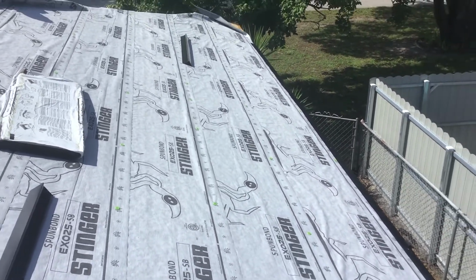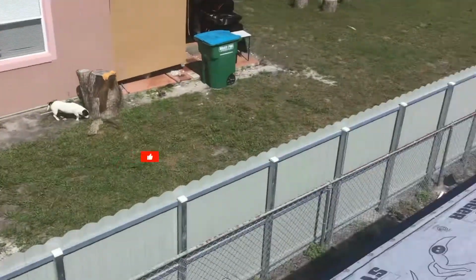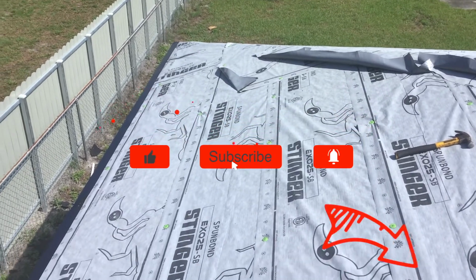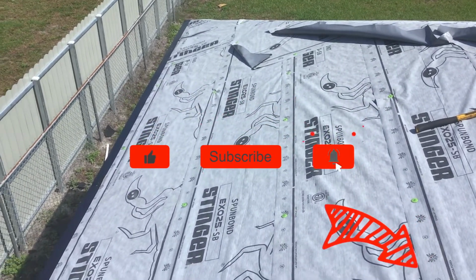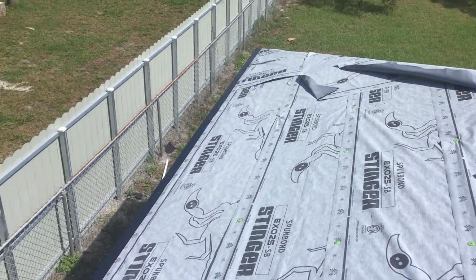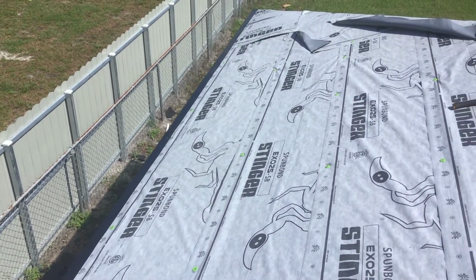This homeowner, we obviously have a contract with the homeowner, and some of the contingency items that we have in the contract are some of the damaged wood. And oftentimes customers go, oh, I'm sure I don't have any damaged wood. And you know, we're hoping that we can hold firm on the price that you guys have contracted us, but we do have some contingencies in the contract.